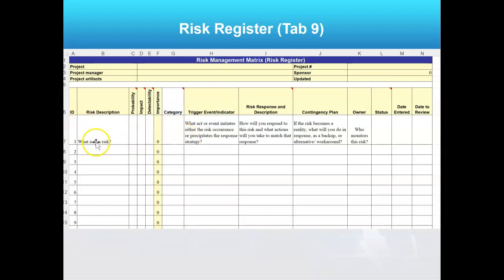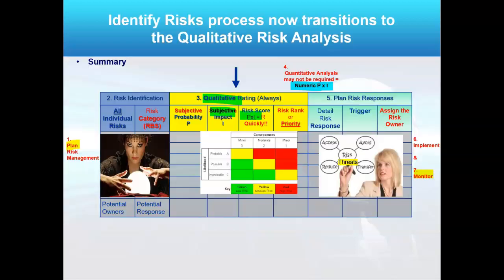Try to put your risks into a risk category. What's the trigger event that you're going to keep an eye on, or your risk manager is? What would be the potential response? What about a contingency plan if you needed some money or other resources to work that risk? Who are you going to make the owner — monitoring for that trigger and building the risk response? Then check regularly on the status, and always look to retire old risks or add new ones as they're found.